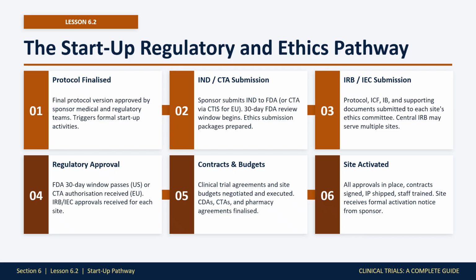Step 6. With all approvals in place, contracts signed, investigational product shipped, and staff trained, the site receives a formal activation notice from the sponsor. Only then may enrollment begin. From protocol finalization to first patient enrolled, global multi-site trials routinely take 12 to 18 months. Every day of startup delay is a day of lost enrollment time.